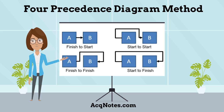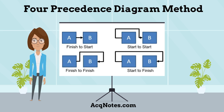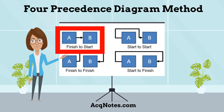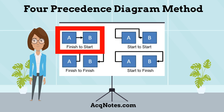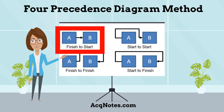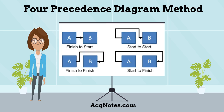The precedence diagram method has four ways for developing the diagram. The first is finish to start — in this dependency, an activity cannot start before a previous activity has ended. This is the most commonly used dependency.